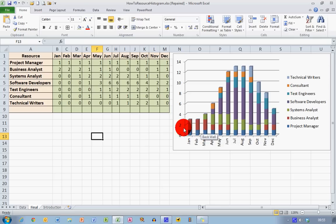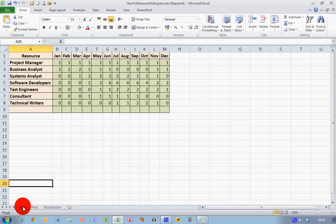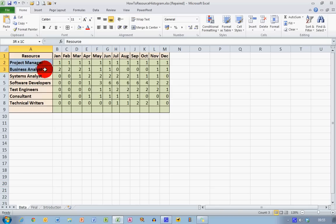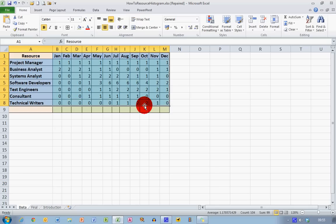So let's see how we can very quickly draw a histogram like this representing our resources. So this worksheet here, I've got the same data as I had on the previous worksheet. And creating a resource histogram is quite a simple thing to do. The easiest way to do it is just to select everything. So from cell A1 down to cell M8 in this case, I'm selecting everything. Labels, headings and all the data here.